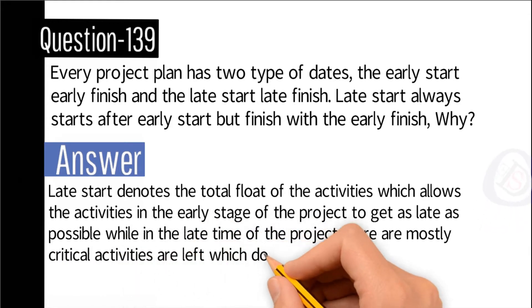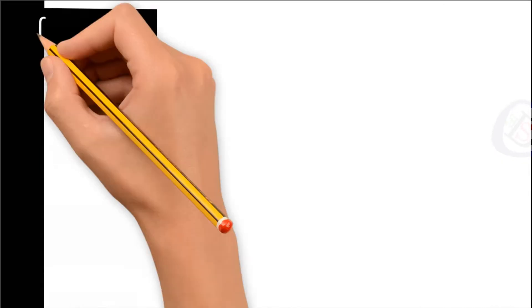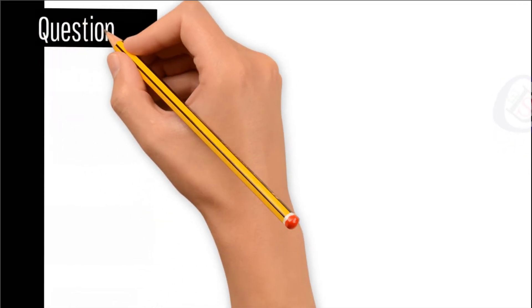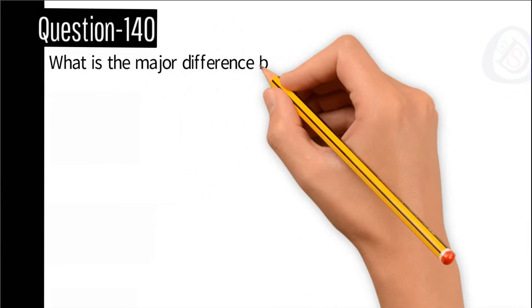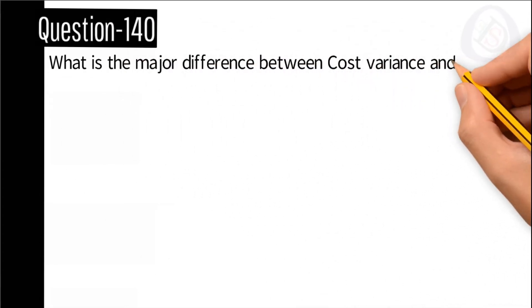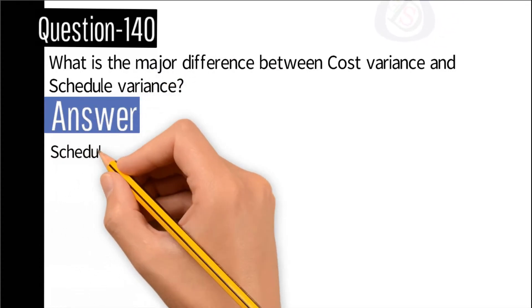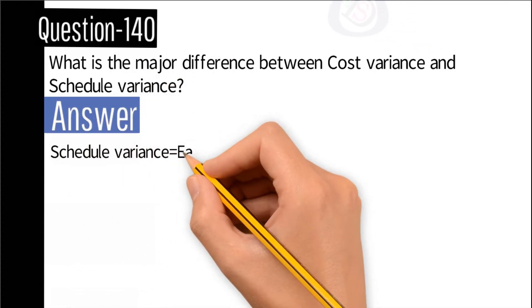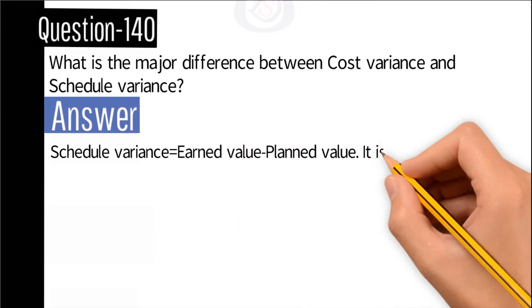Question number 140: What is the major difference between cost variance and schedule variance? Answer: Schedule variance equals earned value minus planned value. It is related to the time or data date. Cost variance equals earned value minus actual cost.